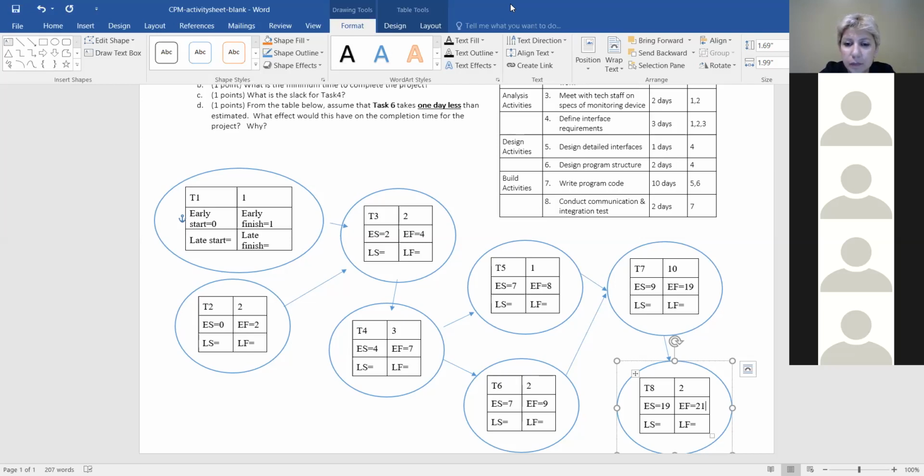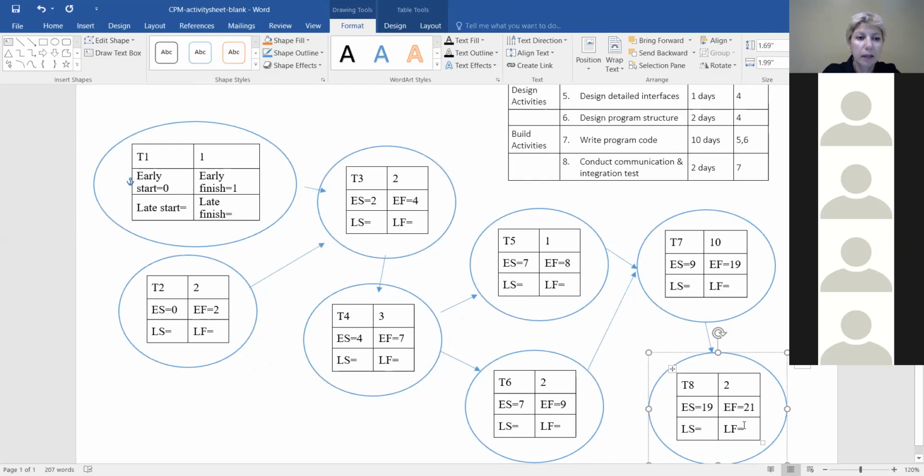Thank you, Nick. This is early start and early finish. We went from the start to the end, and it seems that the earliest we can finish this project is 21 days. There is a topic in project management called buffering. You can add buffer to the end of the project, but we don't discuss that in this class. So we're going to assume that the minimum amount of time is the exact amount of time that we need. So the minimum amount of time is the length of the critical path, 21. That's what we need to finish the project, and we're going to finish the project on day 21.